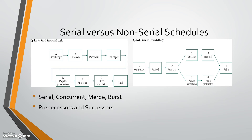There are basically two types of schedules — there are a lot of variations, but to keep it simple. First, there's a serial sequential logic model. Basically it says A must be done before B, B before C, and C before D, and so on all the way until the end of the project.